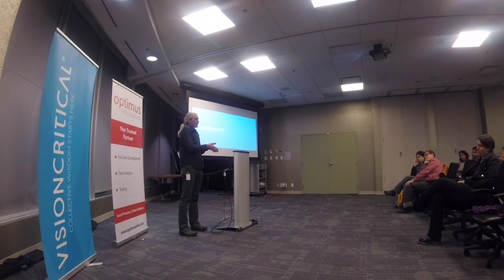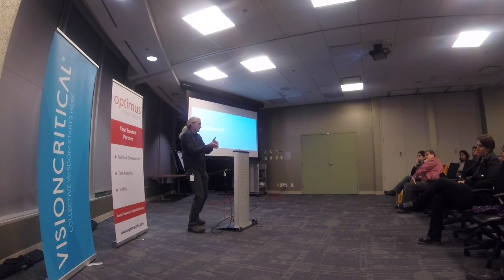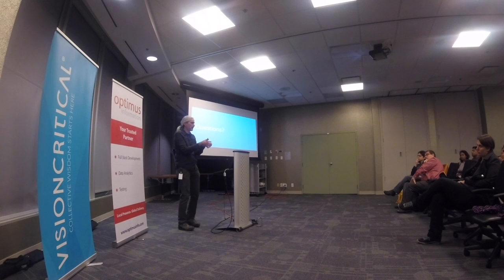If that bug blocks you from doing anything else, like the product is crashing or it's completely unusable, then you stop at that point and you have to go back and get some help to fix it and come back to this. Which typically, if you've got that fixed time scale, means you've now got even less time to do the rest of it. So that definition of done really becomes: how much can I do within that constraint? And have I consciously done the stuff I needed to do first?